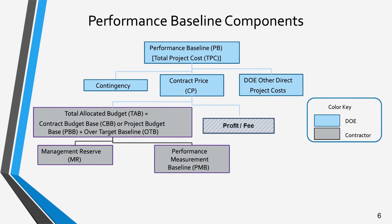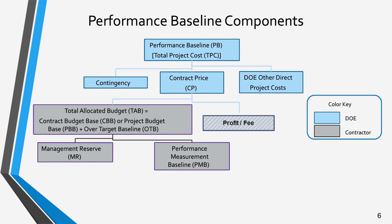The contract price issued to the contractor is comprised of two different components: the profit, or fee, and the total allocated budget, or TAB. The TAB equals the contract budget base unless an over-target baseline has been declared and approved. The contractor then takes the TAB, or CBB, or PBB when no OTB exists, and breaks it down into Management Reserve, or MR, and the Performance Measurement Baseline, or PMB.